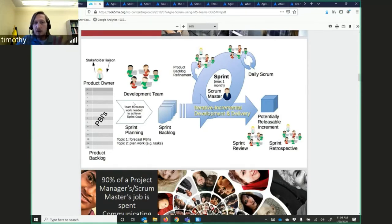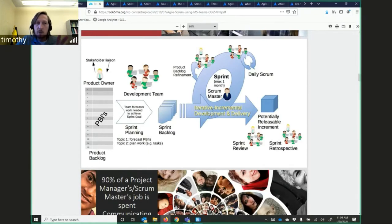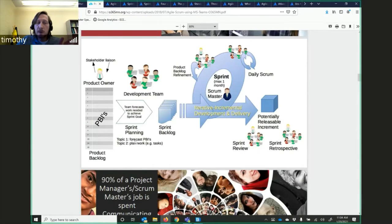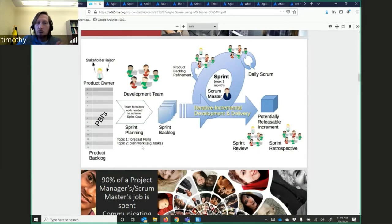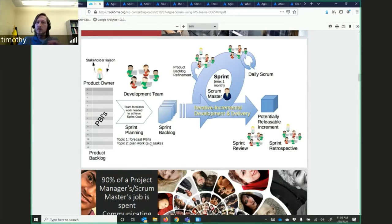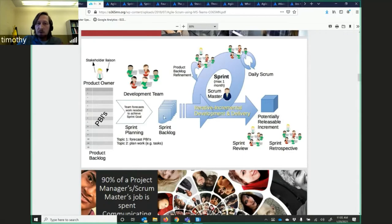During the sprint planning process, the development team, the product owner, they forecast the PBIs, and plan the work, the tasks, for the current sprint. And then they create a sprint backlog. These are items to accomplish.